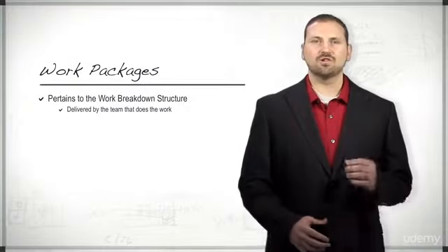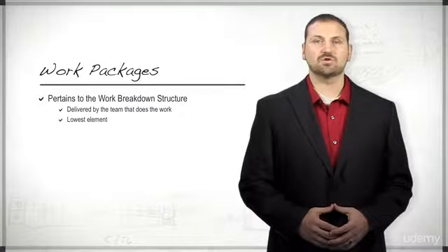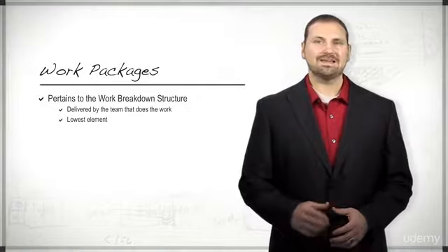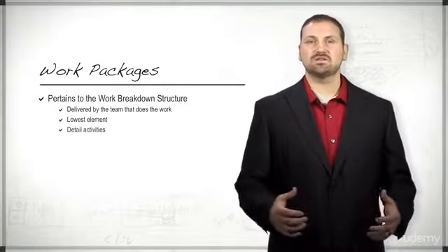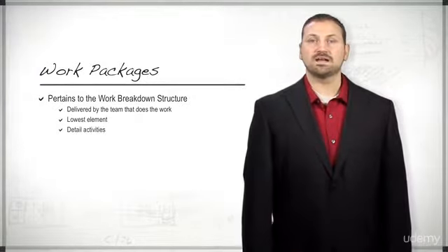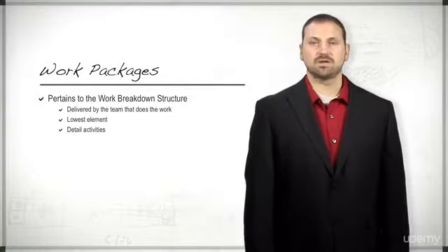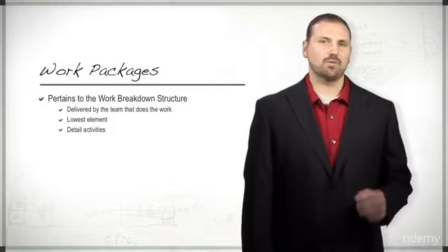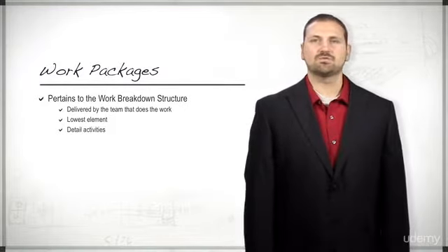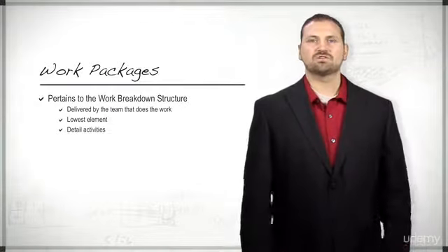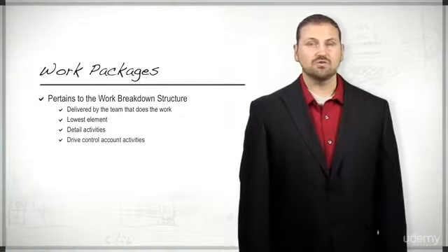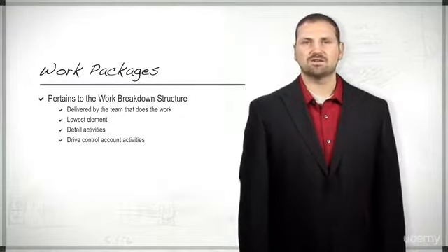Work packages are the lowest element within a project work breakdown structure. They are important because they detail activities that will be monitored and measured as development work takes place to permit earned value analysis to take place, which helps determine the project's productivity at specific points in time, known as project milestones. Work packages are also important because they are used to drive control account activities.